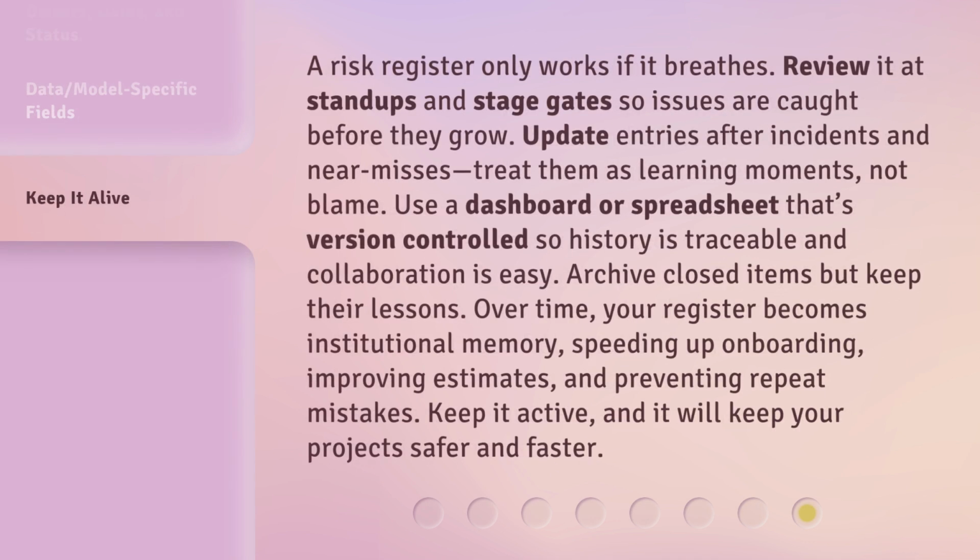A risk register only works if it breathes. Review it at stand-ups and stage gates so issues are caught before they grow. Update entries after incidents and near misses. Treat them as learning moments, not blame.